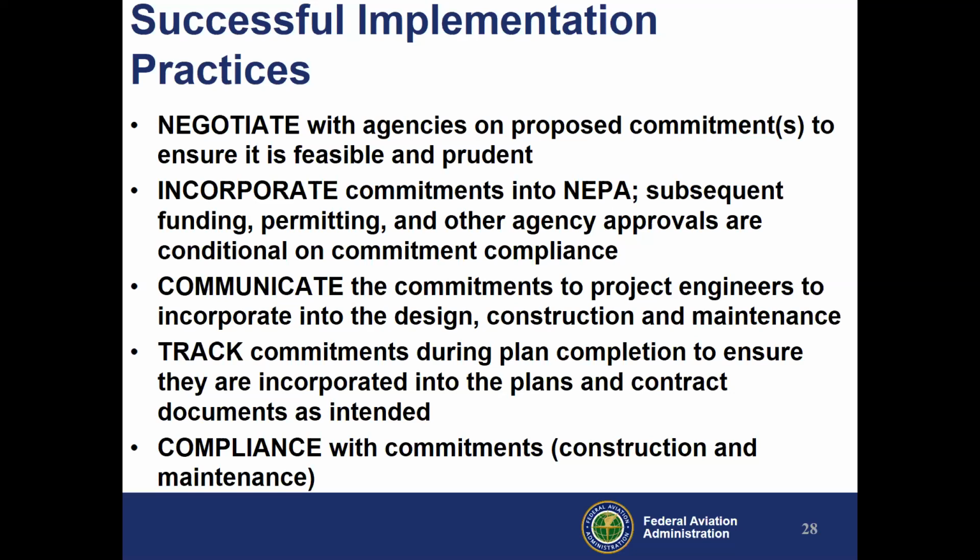Be sure to incorporate those commitments. Subsequent funding, permitting, and other approvals are conditional on that commitment compliance. Communicate commitments to project engineers so that they can incorporate them into design, construction, and maintenance.